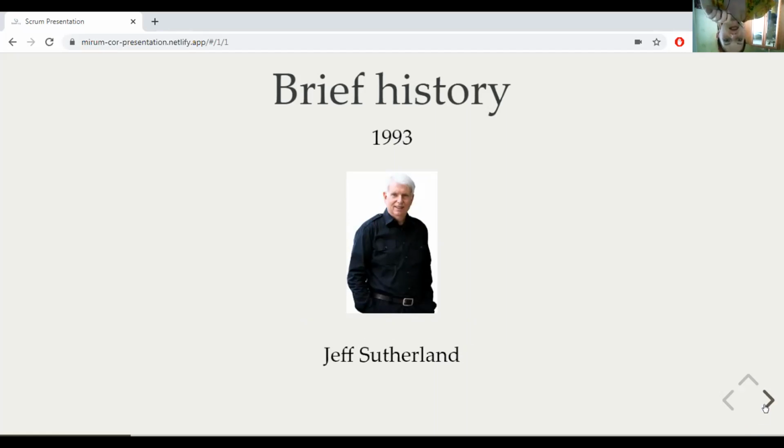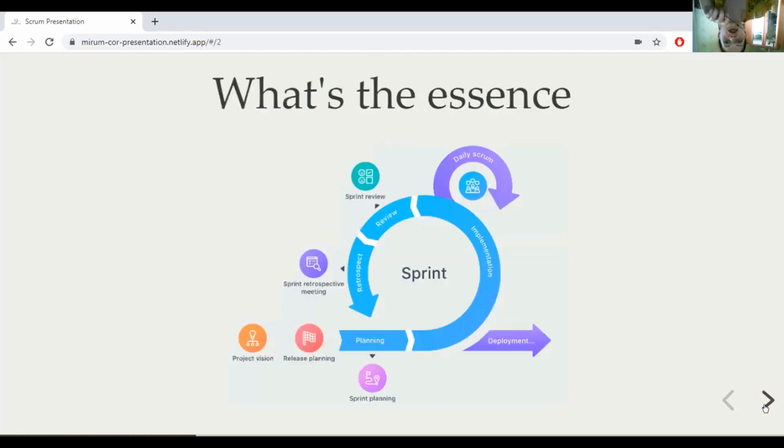What's the essence? Scrum is executed in temporary blocks that are short and periodic, called sprints, which usually range from 2 to 4 weeks, which is the term for feedback and reflection. Each sprint is an entity in itself. It provides a complete result, the creation of the final product that must be able to be delivered to the client with the least possible effort when requested.